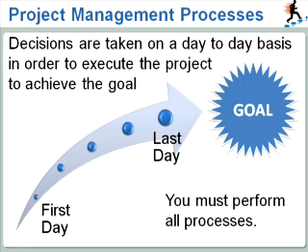You should at least do your due diligence and properly go through the plan, purchases and acquisitions processes from project procurement management in order to make a proper make or buy decision. Once you have that decision, you can then decide how much or how little of the remaining project procurement processes are required on your particular project.